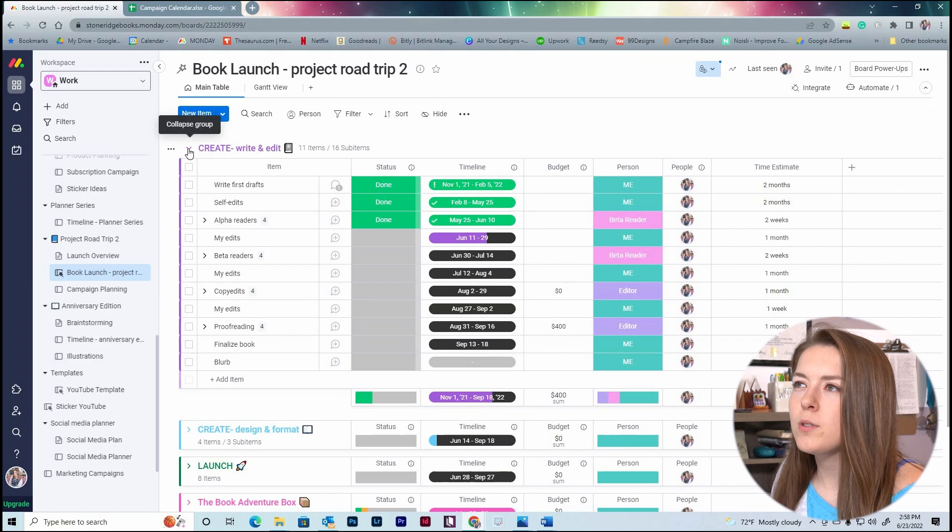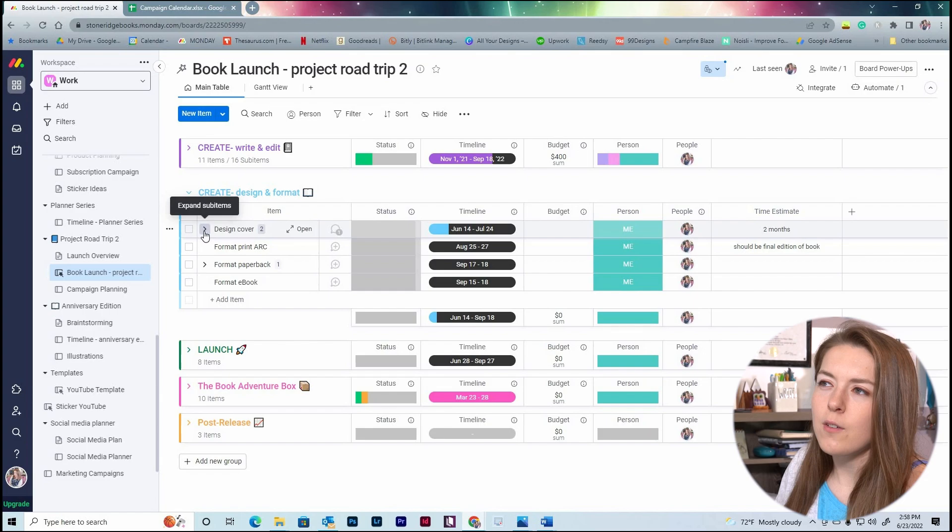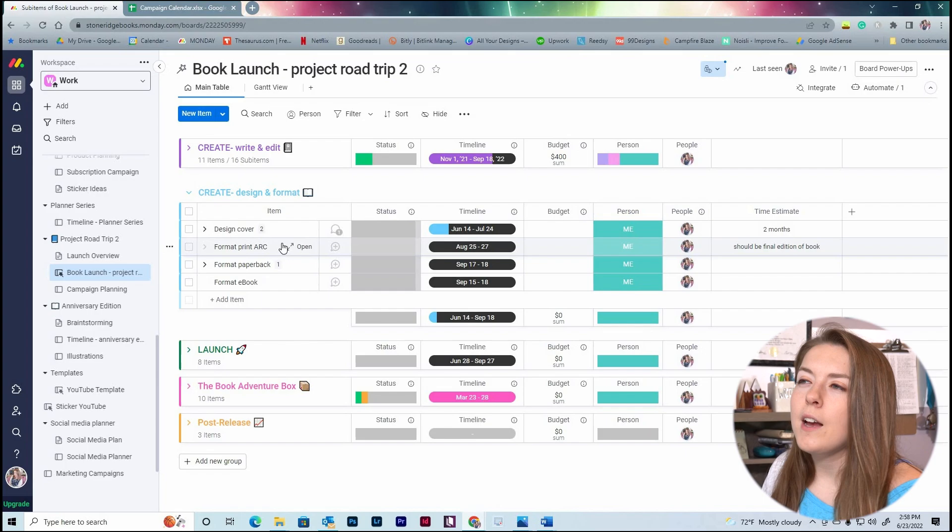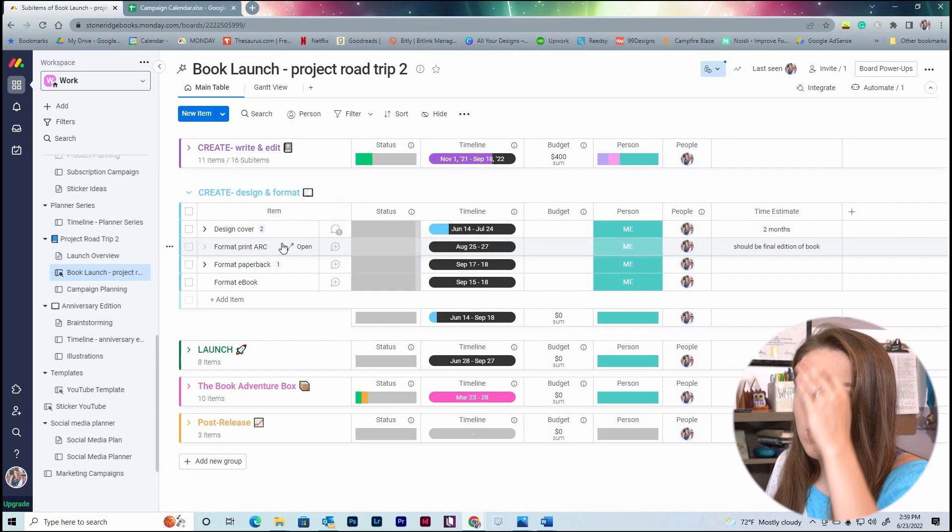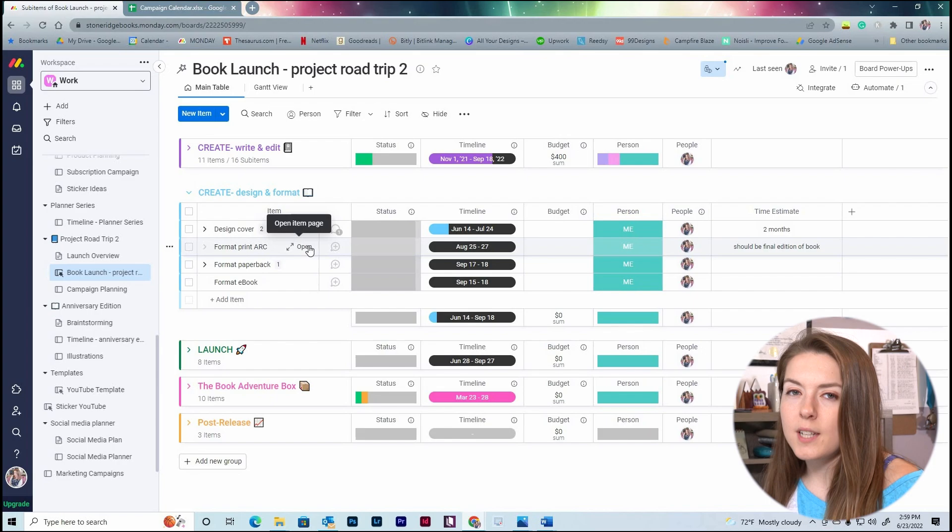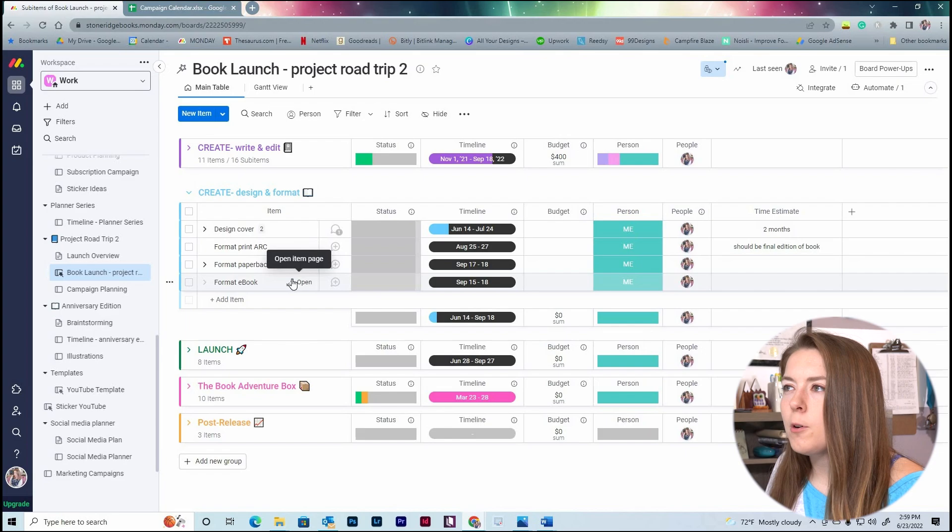I'm going to close that one and we'll open the next one, which is create, which is the design and format section. So we have design cover, and underneath design cover I broke it down a little bit more. So I have a draft cover and finalized cover. We have format print ARC—and ARC is Advanced Reader Copy. I usually like to format the print edition just to physically hold it myself, look through it, make sure everything's okay. And then format the paperback, which is me finalizing it. And then I have the last time I format it to really make sure it's all squeaky clean, and then format the ebook.